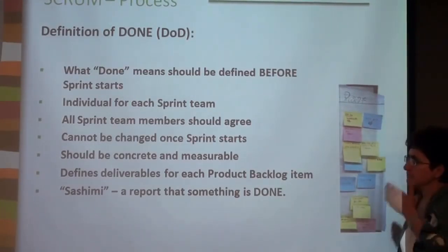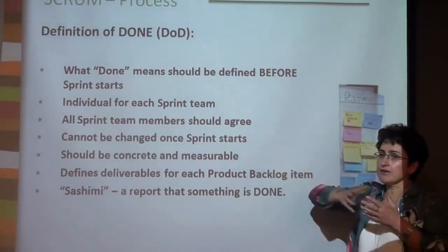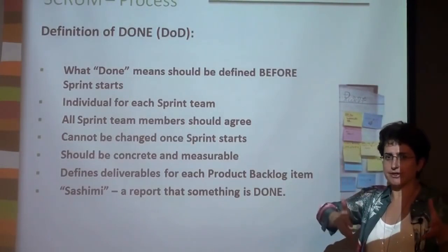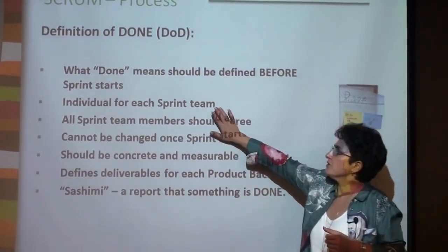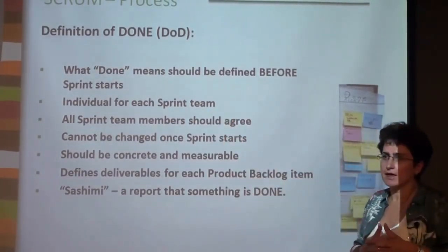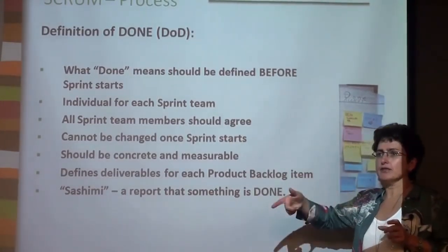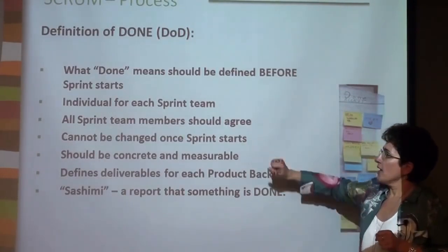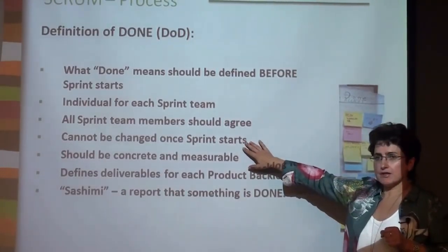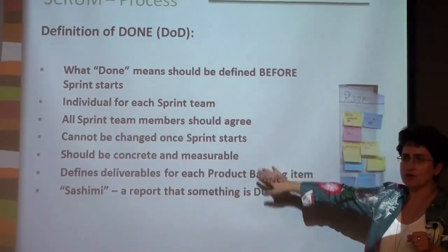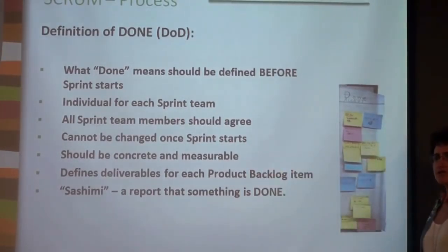And again, there are no standards on what the definition of the done criteria is for your project, because it is individual for each sprint team and for each project. But all team members should agree to this definition of done. And once you start the sprint, you cannot change this definition, because what people tend to do as the team moves